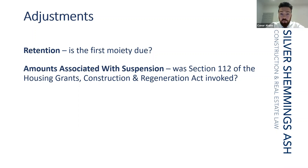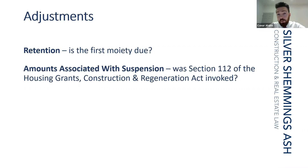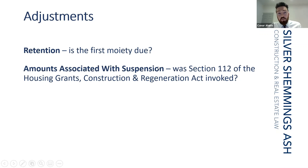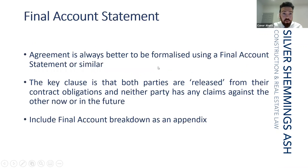Final item on adjustments: amounts associated with suspension. Has Section 112 of the Housing Grants, Construction and Regeneration Act been invoked? If the employer failed to make a payment and the contractor served notice that he was going to suspend the work and subsequently did suspend the work, then any demobilization and remobilization costs associated with that go into the final account as adjustments.